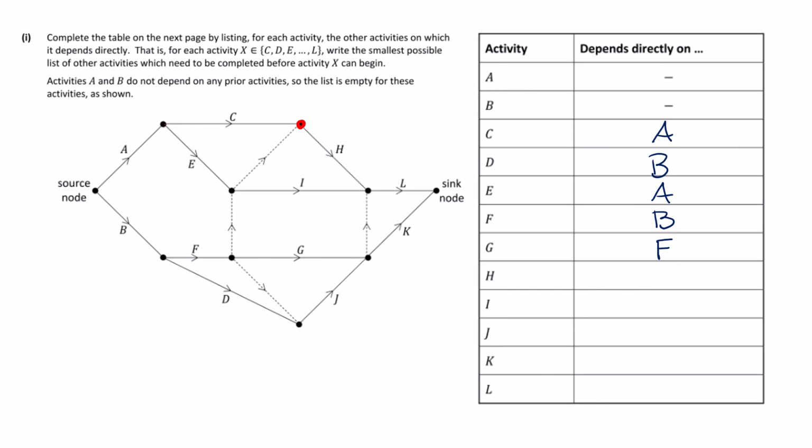And then let's take a look at H. H has C feeding into it. It also has this dummy, where what's feeding into the dummy is E, and then the dummy has another dummy feeding into it, which is F. So we actually have C, E, and F, which H is dependent on.